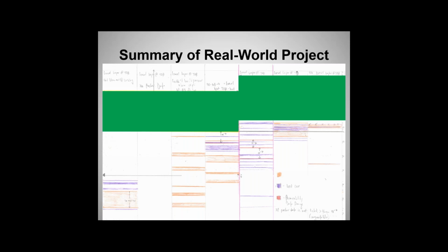But if you're looking at, oh goodness, this could be 100, 200, 300 gallons a minute within the zone, well, now it makes sense that we can provide some value. We can provide some benefit here. So it's not just a combination of all the data provided from the boring logs. You've got to look at it from a cost perspective also, to see if it's really worthwhile. And with that, I'm going to turn this over to Brad.